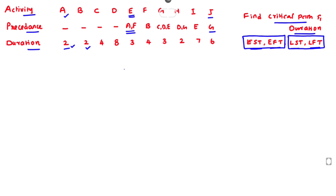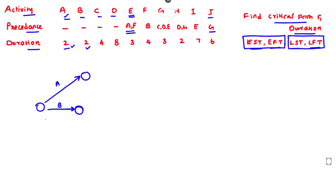Activities A, B, C, and D don't have any precedence relationship. So we can draw them as starting activities. Here is activity A with no preceding activity, then activity B, then activity C, and here is activity D — all drawn from the start node.